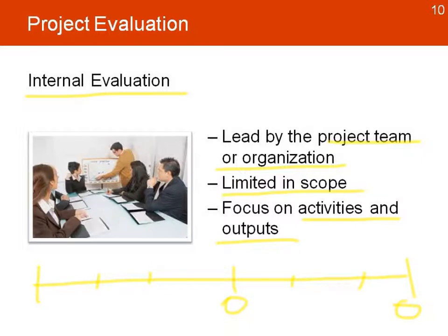This can help the project because if the project is moving one way, then we can change it back, change it, move. So by the time we hit the midterm evaluation, our numbers are not going to be that far off. If we don't do it, then we might be continuing on a path that might be far away from what we want, so the distance from the final evaluation might be bigger, and it will be a surprise to everybody because we saw that change. By making these little internal evaluations, the team can have opportunities to make those little corrections that will help the project and make the evaluation even easier.